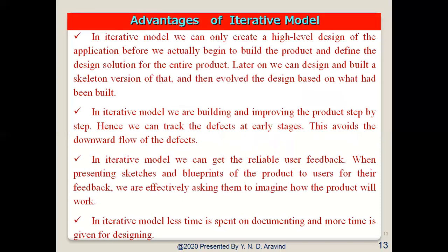The advantages of an iterative model are as follows. In iterative models we can create only a high level design of the application before we actually begin to build the product and define the design solutions for the entire product. Later on we can design and build a skeleton version of that and then evolve the design based on what has been built. In iterative models, we are building and improving the product step by step. Hence we can track the defects at the earlier stages. This avoids the downward flow of the defects.